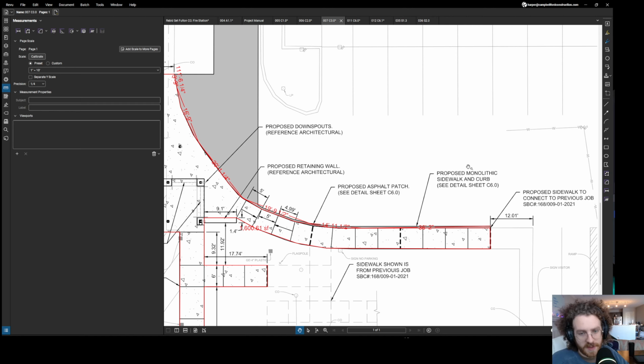But if you do enough estimates, you start figuring out, oh, my price on this kind of job was this much a square foot. It's like, okay, on this job with this scale, scale being used in a different sense there, talking about the scale of the project, how big it is. Is it $1 million? Is it $5,000? Is it $15,000 total? Depending on that total, that's going to affect what that square foot cost is. Because if I'm a big company, I'm not going to do $7,000 worth of work for $7,000. It's going to end up being 10 or 12 because of my resources, and allocating things to that is taking away from my big jobs, so it costs more.